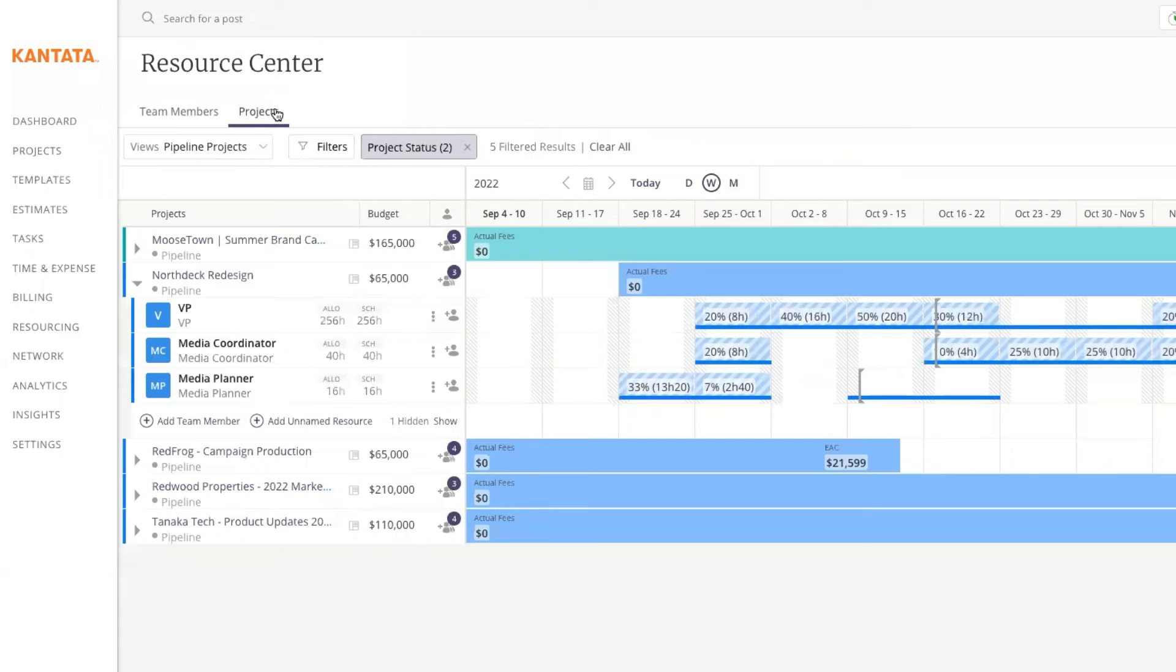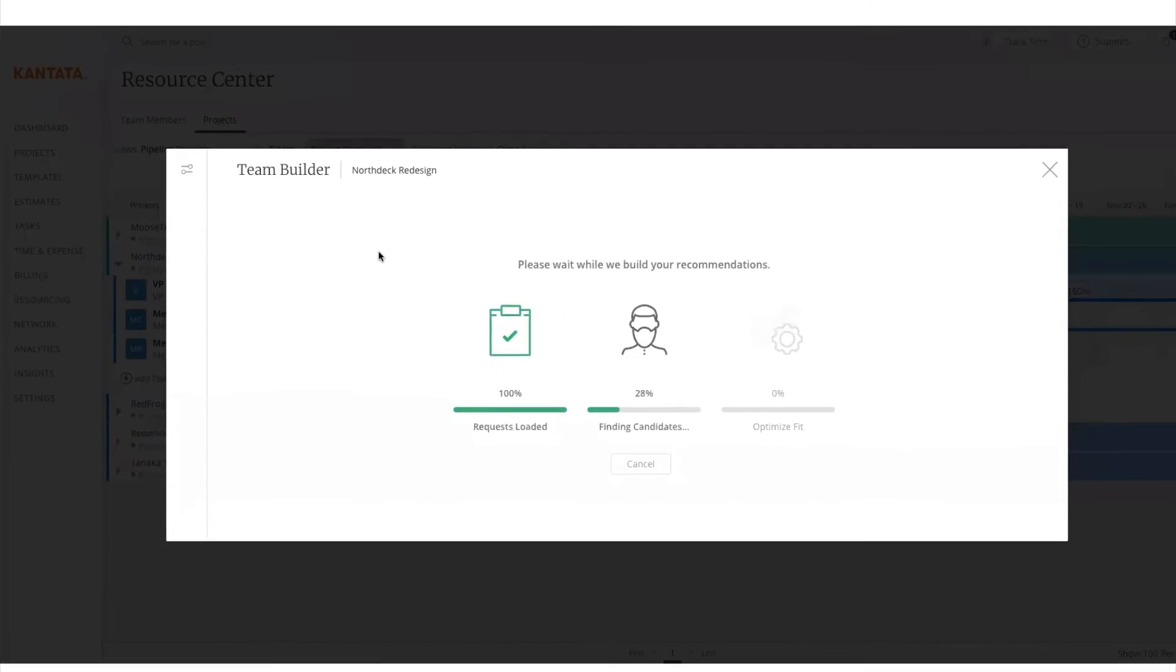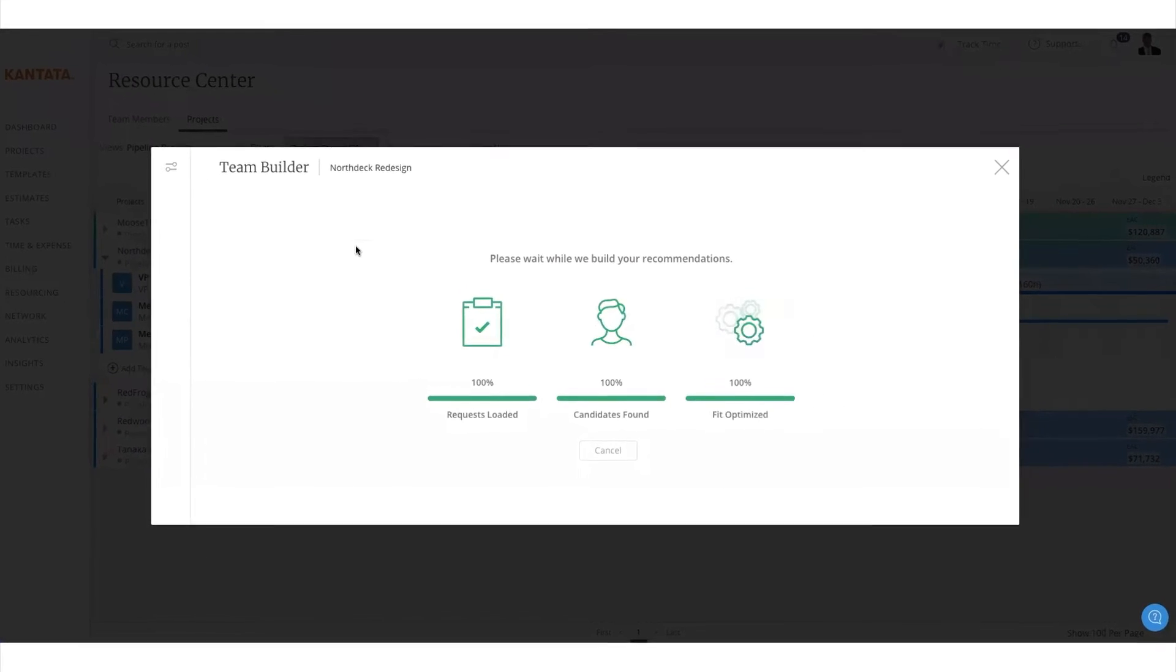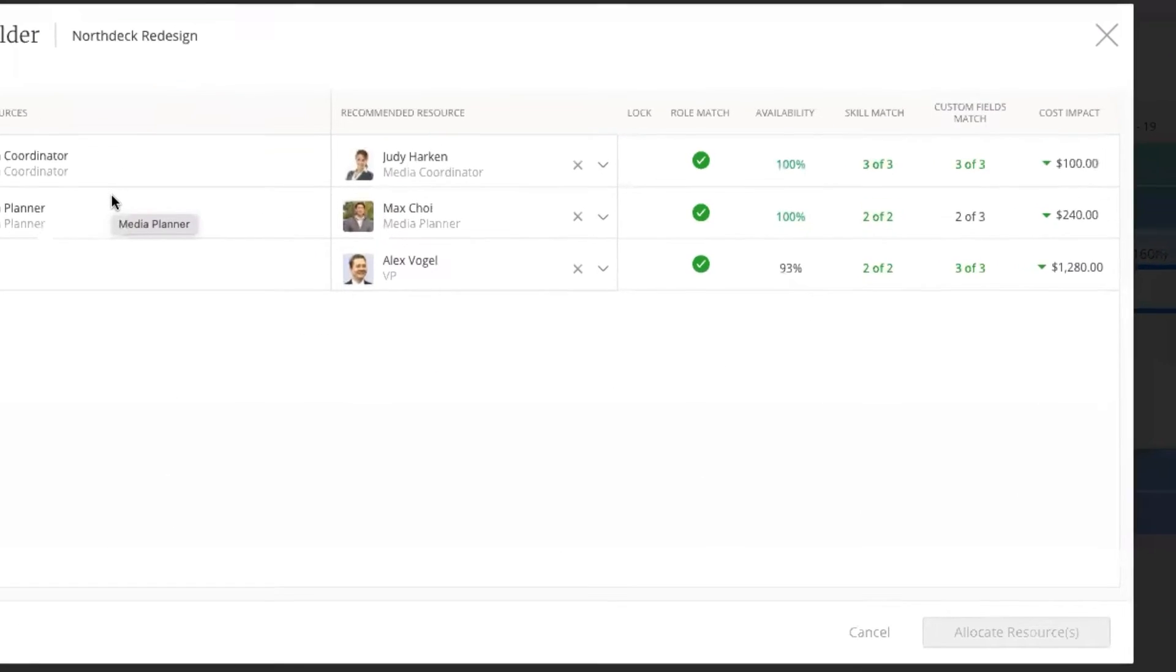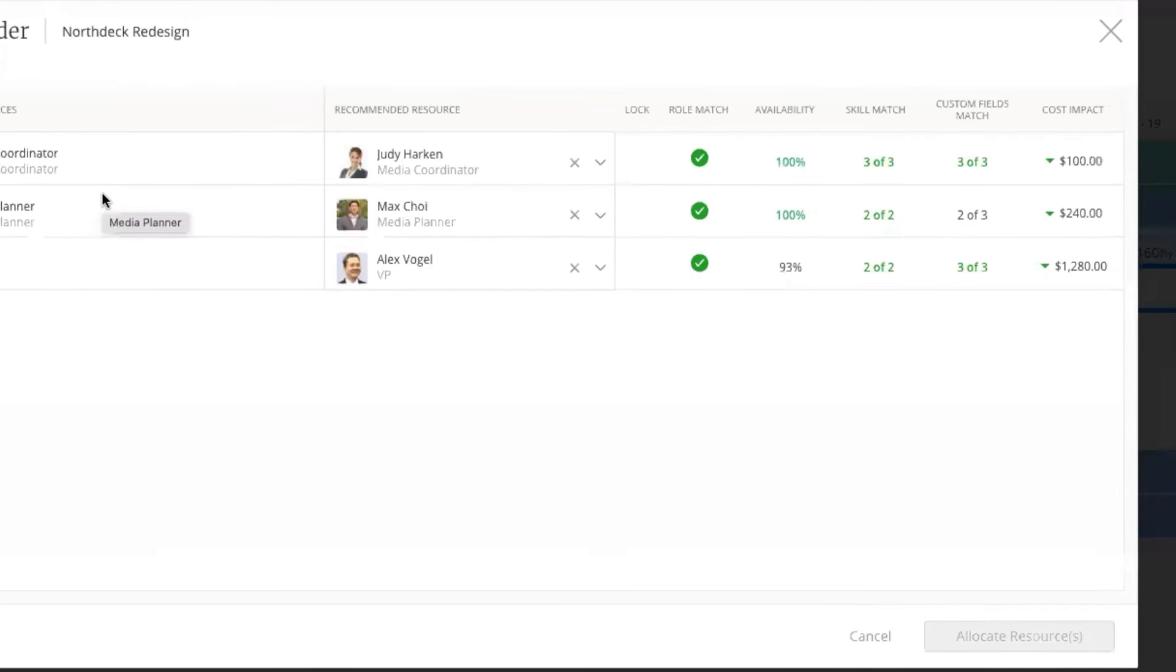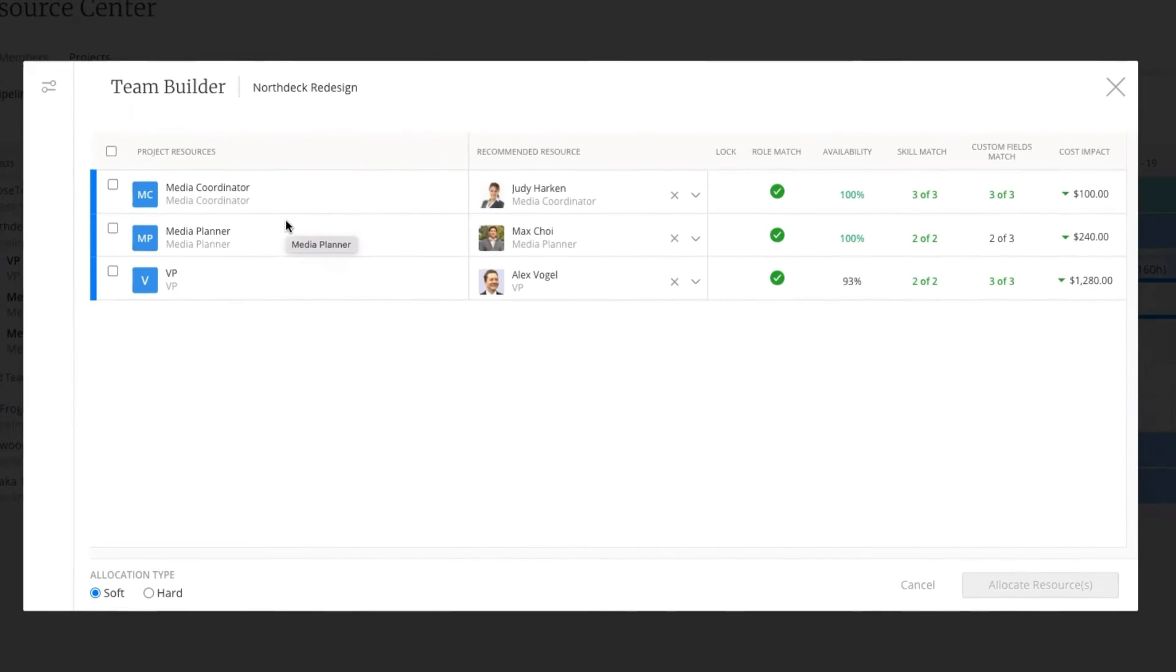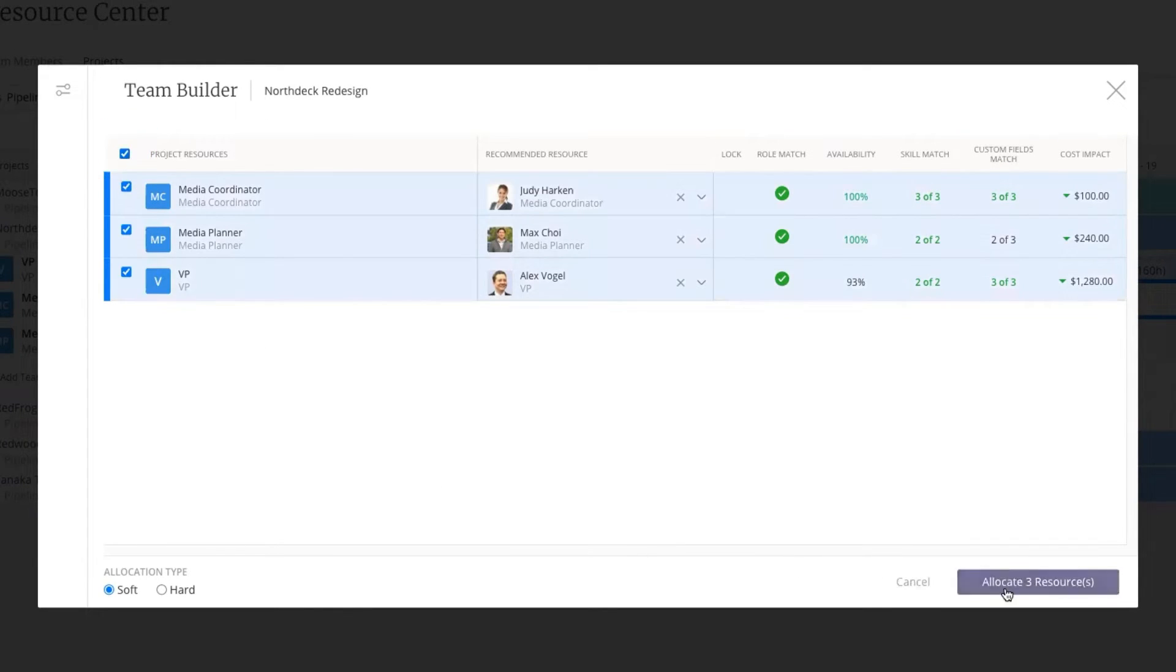Cantata Resource Center's exciting team builder functionality automatically assigns individuals to projects based on availability, skill match, custom fields, and project margin. The Resource Center can even provide full view into your talent network of external resources such as freelancers and contractors.